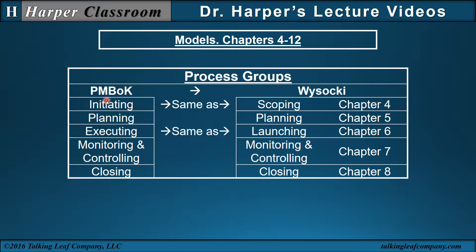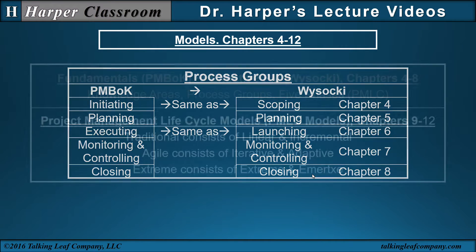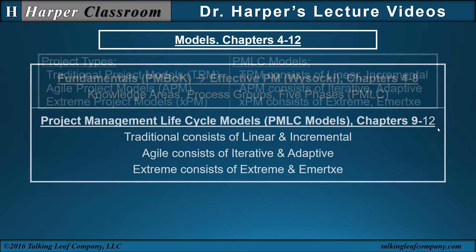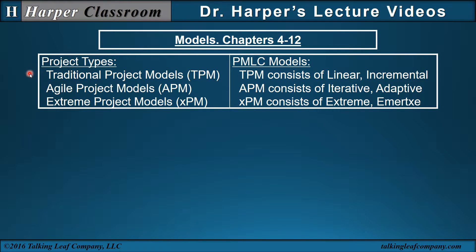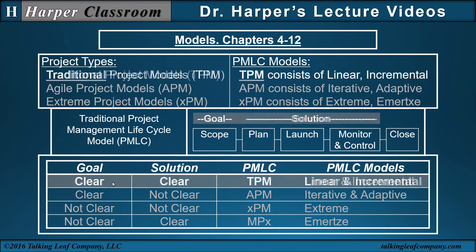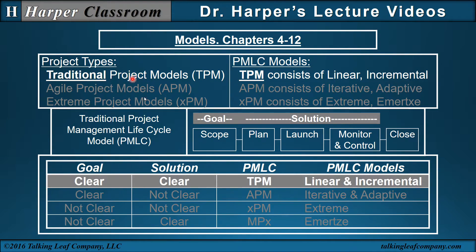Within these process groups, the concept of PMBOK is still contained even though the organization and order is different. Next are the Project Management Life Cycle Models, Chapters 9 through 12. Wysocki defines three project types: traditional, agile, and extreme. Within each project type are two Project Management Life Cycle Models. To distinguish the difference between project types and models, he uses the description of the goal and solution of a project. If the goal is clearly known and the solution is clearly defined, then that is a traditional type project with two Project Management Life Cycle Models.